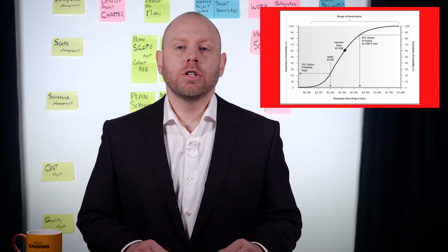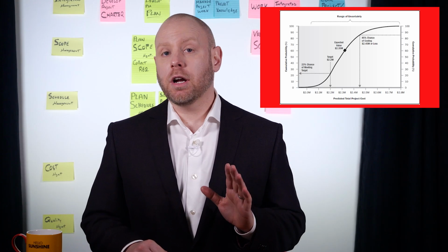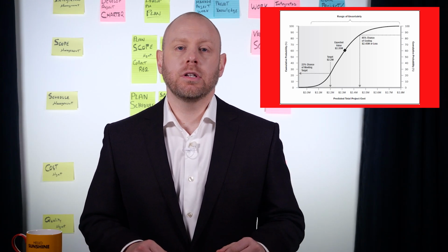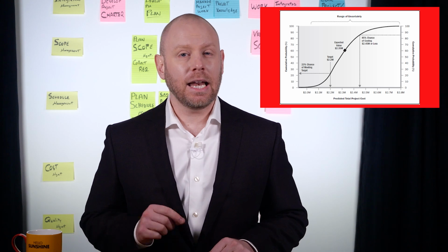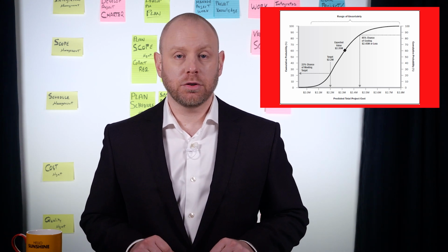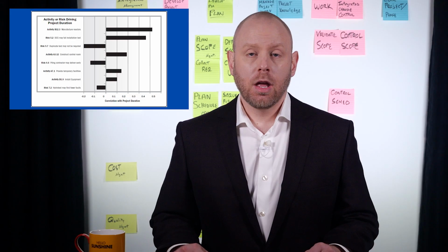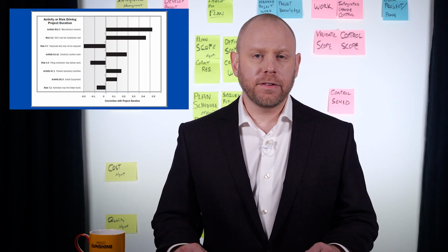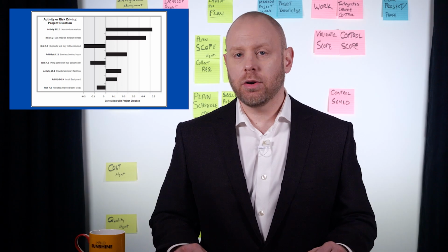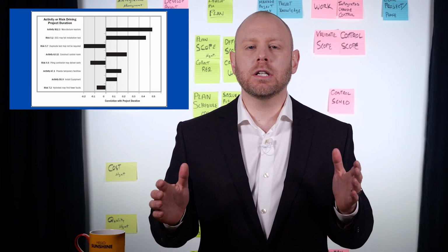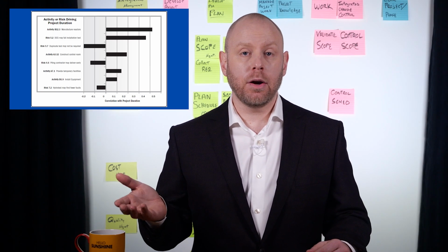Simulations allow us to factor in various impacts of risk. A Monte Carlo analysis or simulation is one method of being able to appreciate the likelihood and impact of potential risk. A sensitivity analysis, sometimes called a tornado diagram, represents a correlation coefficient between risks and the influence on project outcome. Essentially, how strong is the relationship between the risk and impact on outcome?